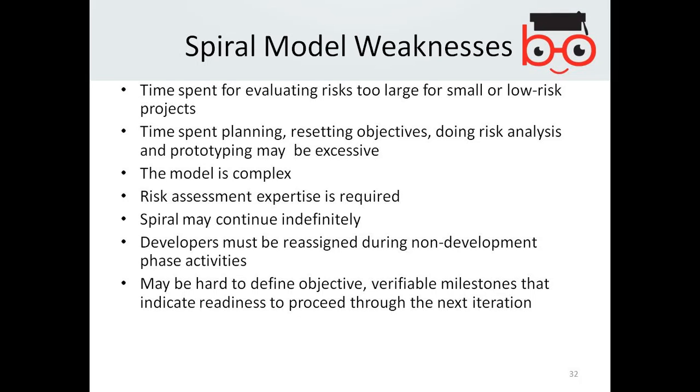But that's a weakness of this model, that for small projects or low cost projects, that's not good. Time spent on planning, resetting objectives, doing risk analysis and prototyping may be excessive. Model is complex. Risk assessment expertise is required. So you can't say that, I take the risk, this part is very difficult, it will kill your time. You can't say until you have an expert who can explain to you that that particular part is risky or not.